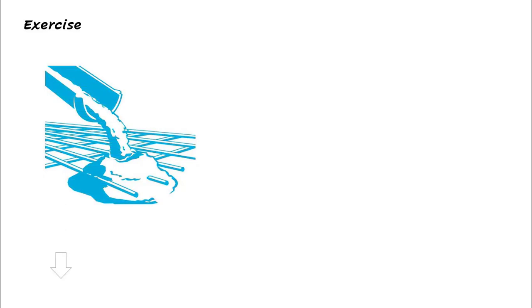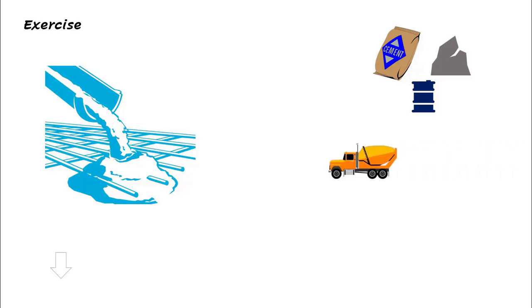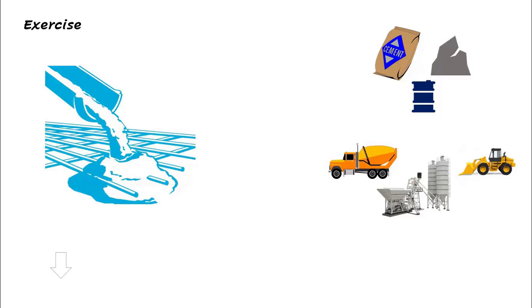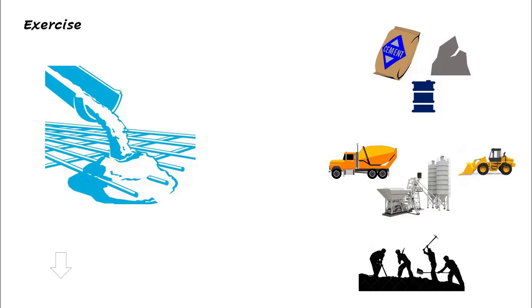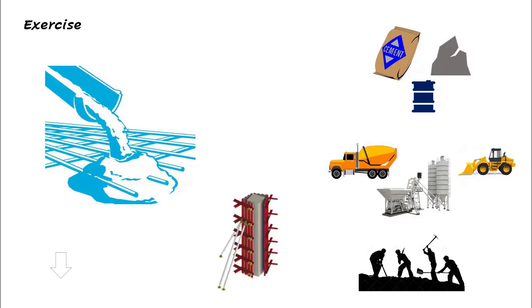Now let's do an exercise — analyzing the unit rate of concrete, with the unit of measurement in cubic meters. Cement, aggregates, admixture, and water fall under the material part. In the machinery part, we have the transit mixer for conveying concrete, the batching plant with generator for production, the wheel loader for feeding aggregates, and a concrete pump. The labor includes workers for production, placing, laying, vibrating, curing, and shuttering — which is most important for casting concrete structures.